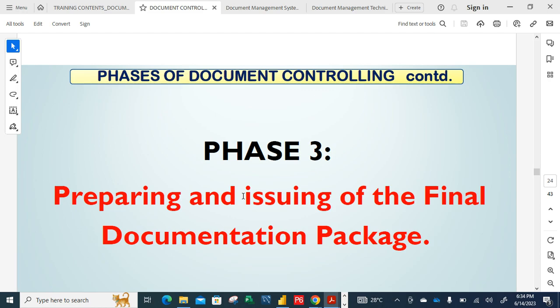And also you need your transmittal sheet as a receipt or evidence to show that a document has been issued out. And of course, it will capture the date and time, and whoever is sending out and pushing their document out. Your name will be there, your signature will be there, and the date you're pushing it out. Those are for evidence purposes. You keep those things as evidence so that at the end of the project, you'll be able to cross-check if anything is missing.